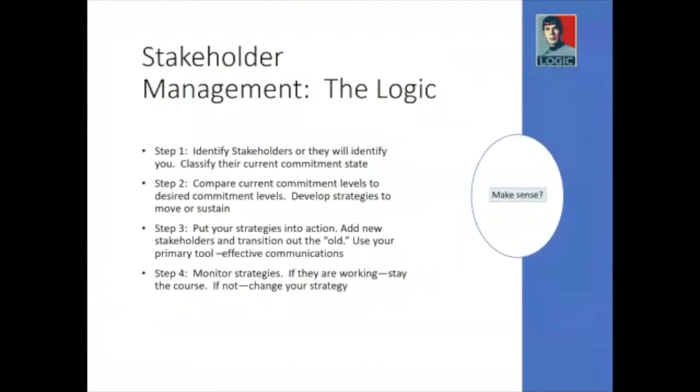Now, stakeholder management, the logic. Identify stakeholders or they will identify you. Classify their current commitment state. Step number 2, compare current commitment levels to desired commitment levels and develop strategies to move or sustain. Put your strategies into action in step number 3. Add new stakeholders and transition out the old.